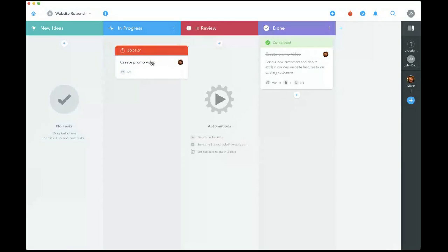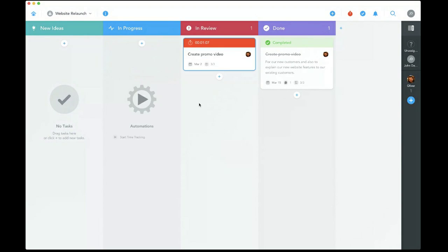Let's say we already uploaded the promo video here and we are done with this task on our end. Now moving into in review here again, we'll trigger 3 different actions. First of all, the time tracking stopped. You can tell there's no red indicator anymore here. There's no time tracking up here anymore. And we also send out an email automatically to Rafaela that this task is actually up for review. And we also set the due date, and it's even visible on our preview from before, to be due in 3 days, because we want to make sure that nothing piles up in the in review section here.